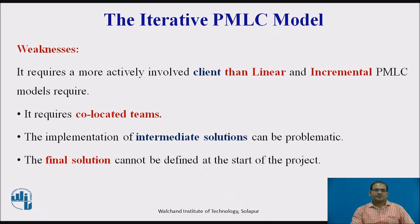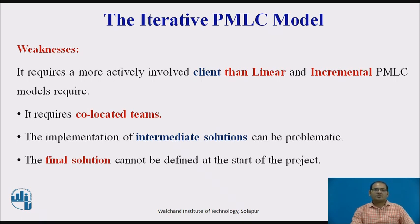The weaknesses include that it requires a more actively involved client team than a traditional project management team — the higher the likelihood of change, the more you need active client involvement to make good business decisions. It requires a co-located team, which is usually not possible and places a high-change project at great risk. The final solution cannot be defined at the start of the project; the less you know about the solution at the beginning, the more unexpected it may be at the end. You might have started out thinking you would solve the entire problem but ended up solving only part of it because time or budget ran out, or parts of the problem turned out to be intractable.